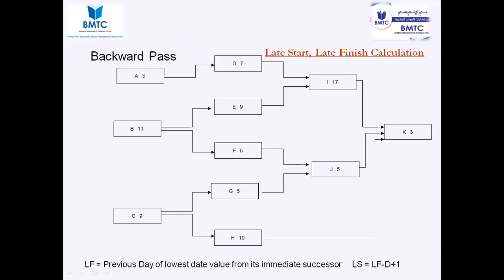So take the formula for the late start: late finish minus duration plus 1. Plus 1 and minus 1 is for our mathematical convenience since we have taken day 1. This is my first day in this company and we have to start the activity on day 1, so we are taking 1 as a number, and we need to use minus 1 and plus 1. If you're going to start activity A on day 0, there's no need for you to plus 1, minus 1.